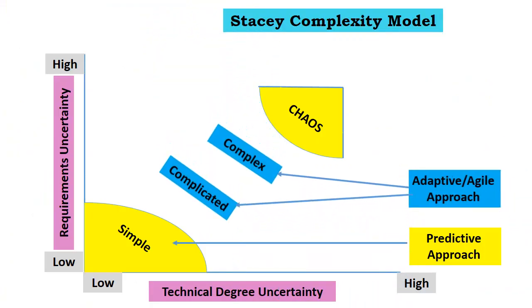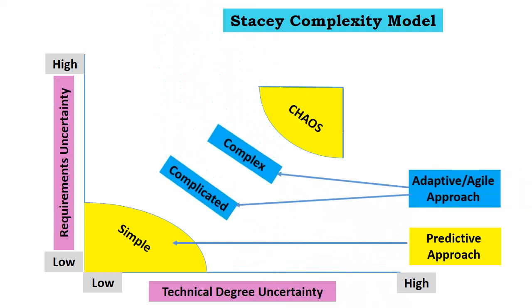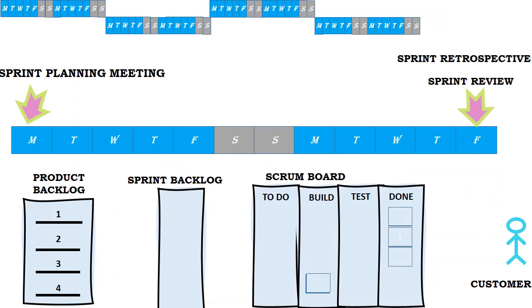Uncertainty, risk, and life cycle selection. Some projects have uncertainty around project requirements, and they also have uncertainty around technology. As project uncertainty increases, so too does the risk of rework and the need to use a different approach. To mitigate the impact of these risks, teams select life cycles that allow them to tackle projects with high amounts of uncertainty via small increments of work. Teams can verify their work when they use small increments and can change what they do next.